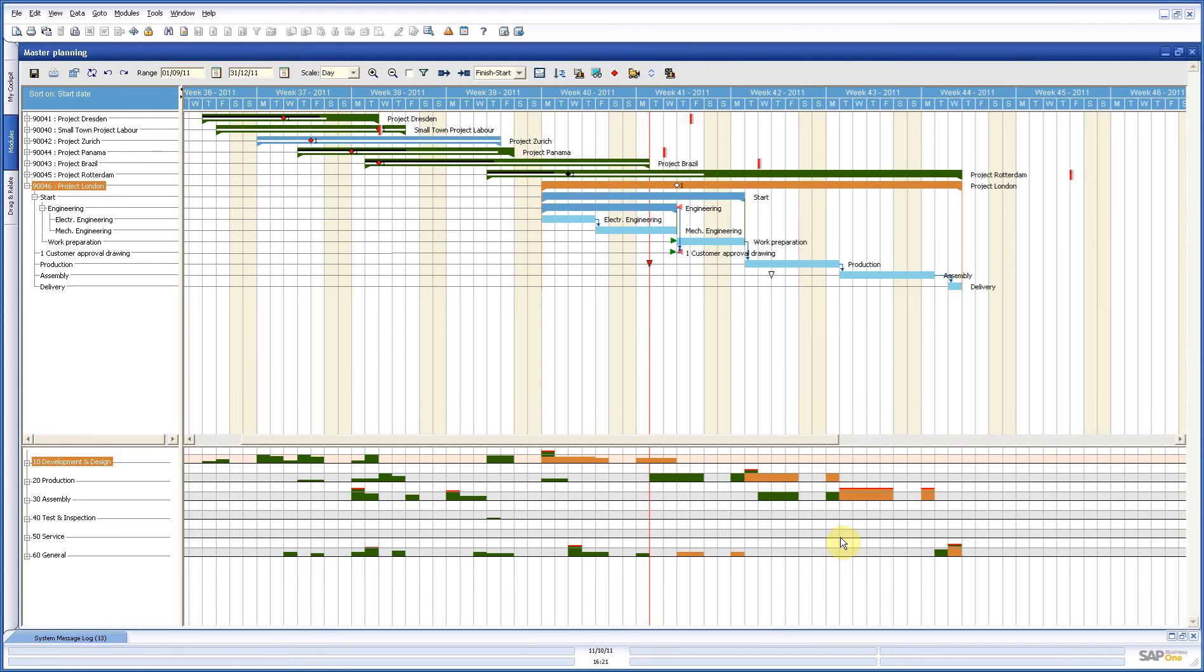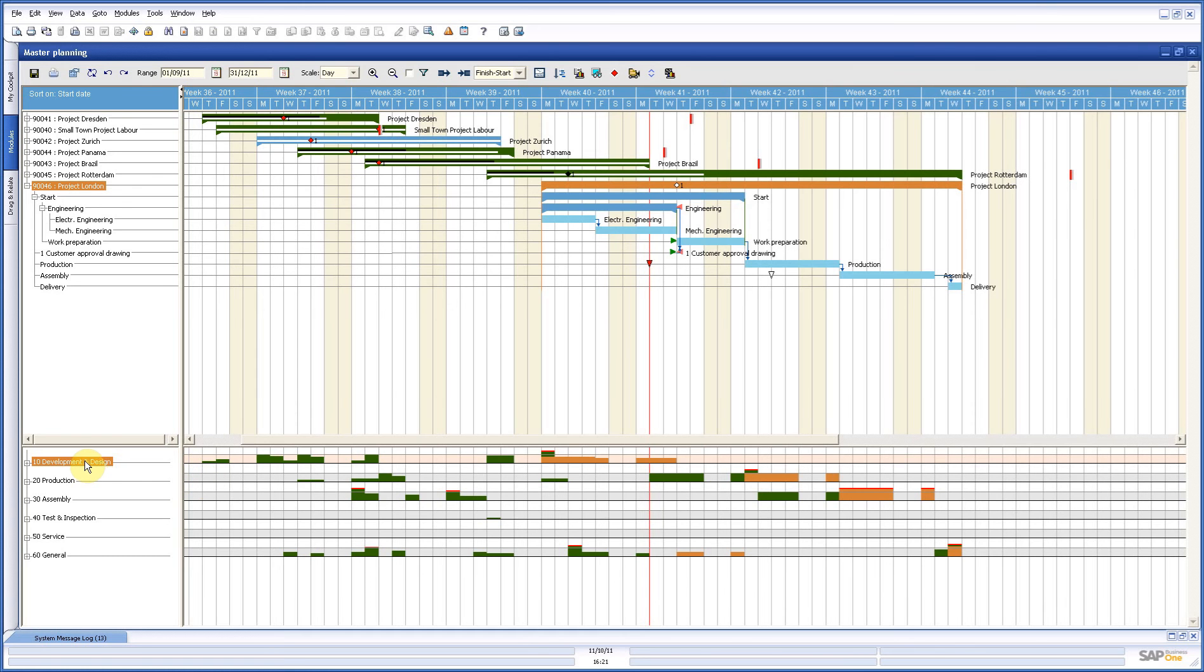Now, if we see this, how can you solve problems in this case? Now, first of all, you can say I do nothing. I know I have some buffer in my company and it is not too much. I can do it. That is fine. Second solution you can use is that you get in more people in a certain time. And then the system says fine, then you can do that as well.